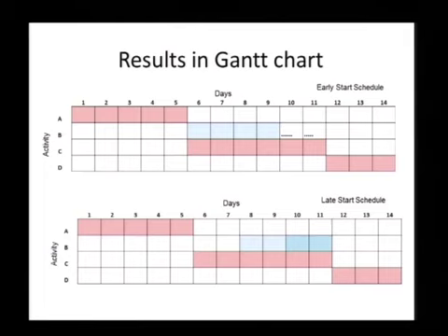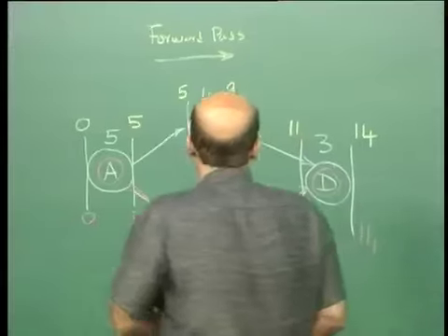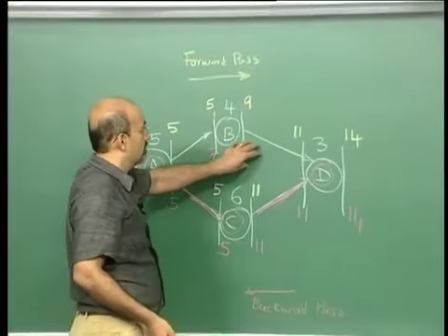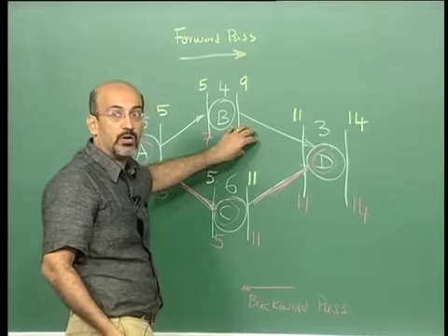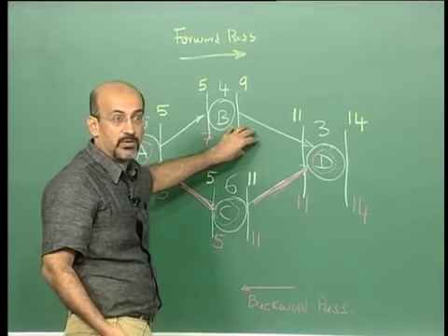B. Yeah, so the only thing I can do when I move to late start is to move B all the way to 11, and if I move B all the way to 11, the project is still okay.